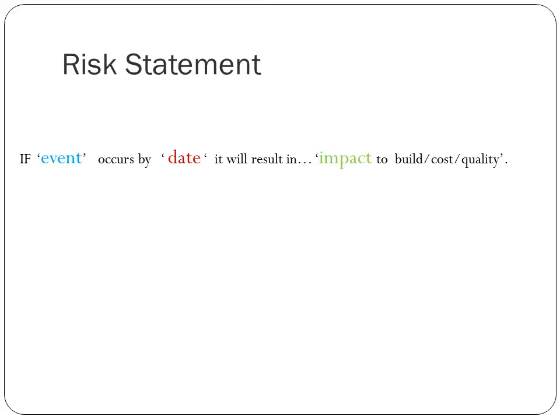We begin by identifying a risk, and every risk is identified by a risk statement. If a specific event occurs by a given date, it will result in a specific impact — an impact on the construction project itself, the scope, the work breakdown structure, the costs, or the quality of the project itself.